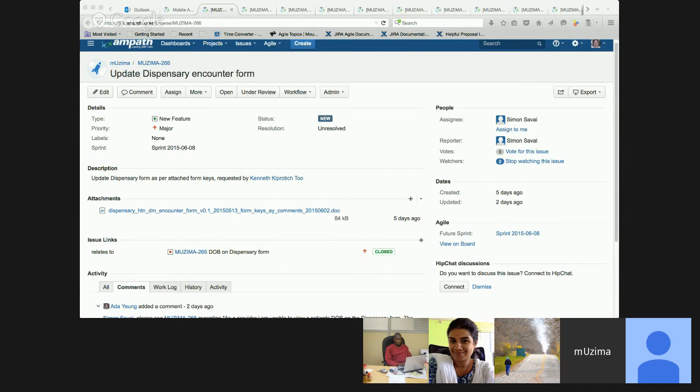I would say the basic 70% are the same as the original form, but I think it would require adding additional validations. That's my understanding. Working on forms always seems straightforward and simple, but usually it requires more time and effort because it's always going back and forth between the implementers and the developers. It's just my personal view. That's why I picked 5.